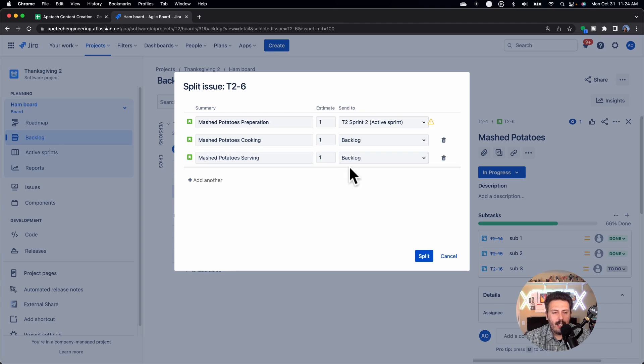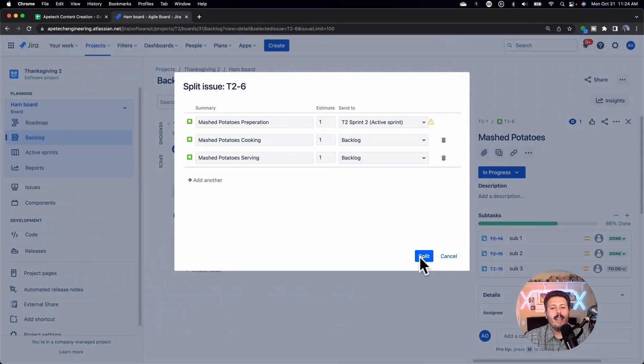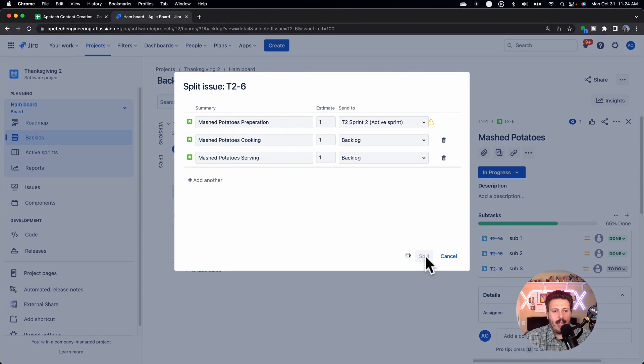And so depending on that conversation, whatever you and your product owner decide, however you want to tackle this particular problem, you can essentially create your stories, put your estimates, figure out if you're sending to a future sprint, or if you're sending them to the top of that backlog. And then once you've kind of figured all that out, then click that split button, and now Jira is going to allow you to close out the top one.